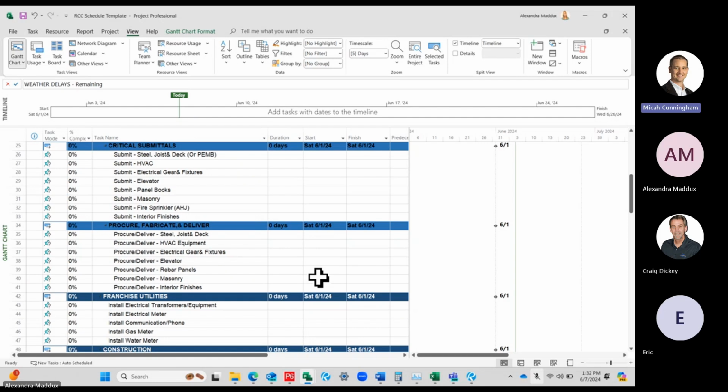So that would be dependent on your contract. Some contracts require it to be done at the beginning for all that detail. The best practice would be for all of that to be broken out at the beginning. But sometimes you don't know what the design is going to be because it's not finalized. That's where you would have a chunk of time that you then replace later. It just has to fit within that chunk of time. Does that answer your question? Yeah, like a 6-week chunk. Ideally you'd have that all broken out into the details, but if you can't yet, then you can't. It is what it is.